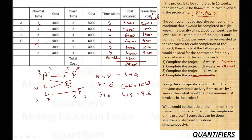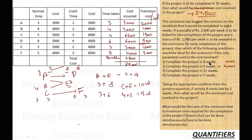For 11 weeks (full normal time with no crashing), all activities run at normal time and cost: 3,000 + 8,000 + 4,000 + 3,000 + 5,000 + 4,000 = 24,000. But for 3 additional weeks the penalty is 7,500, making total 31,500. That's worse, so this option is cancelled. The 8-week option cost 30,000 and the 9-week option cost 29,000, so the optimal choice is 9 weeks at 29,000 rupees — option 2.